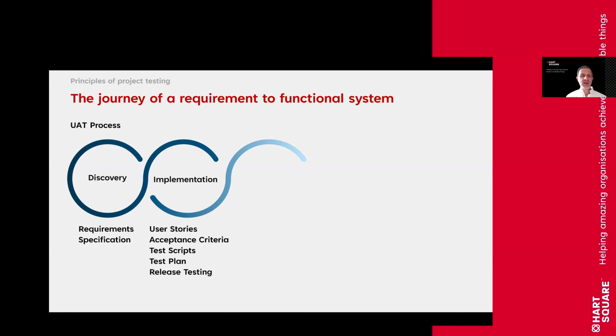And really important that internally, someone within your organization starts to define and accept those acceptance criteria. It's important to do that early on, because if there's something wrong with the acceptance criteria, you can, at a very early stage, go back and say, this acceptance criteria isn't fit for purpose. It doesn't fully meet the user story that I think it does, or my expectations are different. And if it's done early in the process, it allows everybody the ability to address it. Far too often, in my experience, the issues get found far too late in the project, when UAT is a very compressed period of the project.